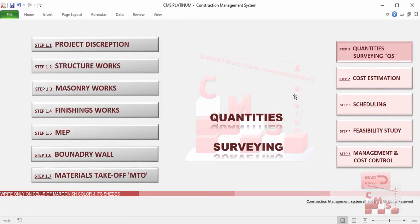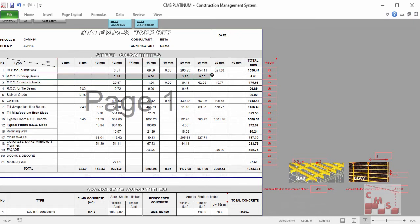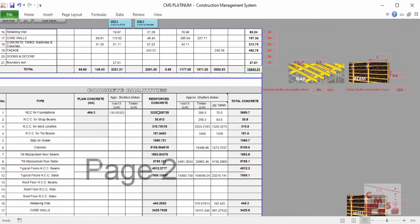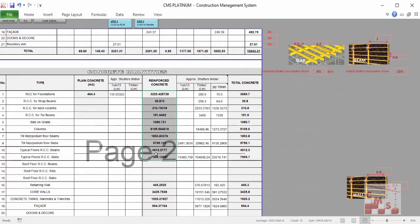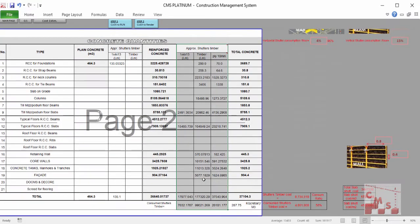All data produced from quantity surveying is reflected directly in the material takeoff. We can see all types of concrete, all rebar per diameter — for each member we have a detailed quantity of rebar, and at the end we have how much each element requires for all diameters of rebar, giving us the full quantity required for the project, plus the same for concrete — how much is required as reinforced or plain concrete. CMS will also give us the approximate shutter required for all concrete elements, plus the shutter margin, which CMS uses automatically to calculate the cost for each concrete element.